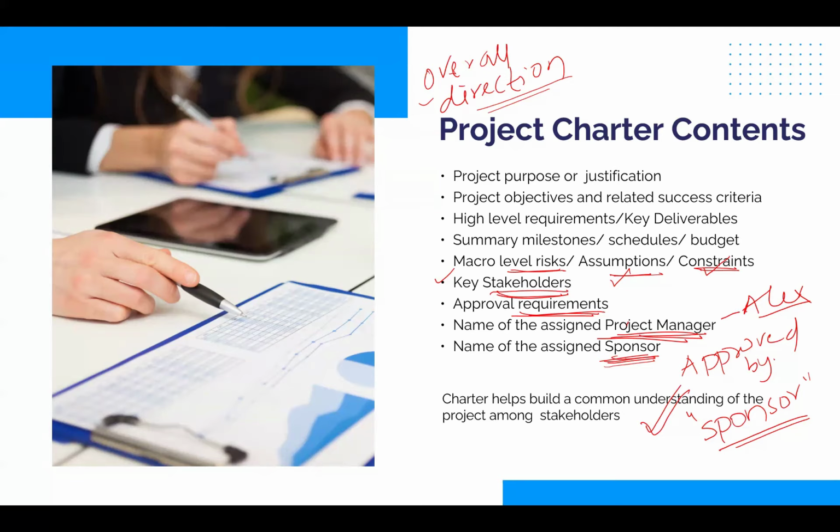Next, major decisions, all major decisions would be with the sponsor. Small ones, you could leave it to the project manager to make, but any major decision, sponsor is going to make. More, arranging funds, whose responsibility is arranging funds for the project? Sponsor, very clearly. All right. More, sponsor would participate in major reviews in the project, not in your weekly team meetings. We're talking about major reviews, end of phase reviews, milestone reviews, and all. Sponsor would join. Also note, sponsor is responsible to provide needed resources to the project manager.